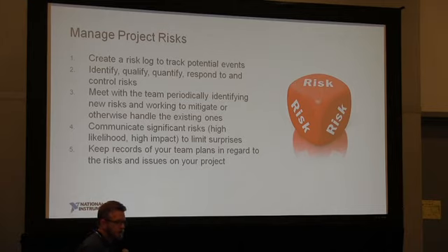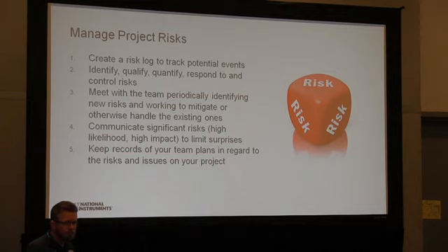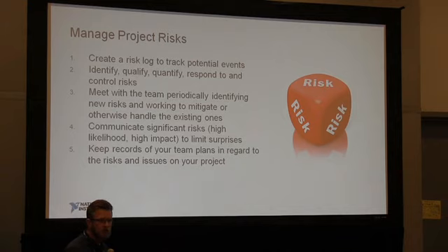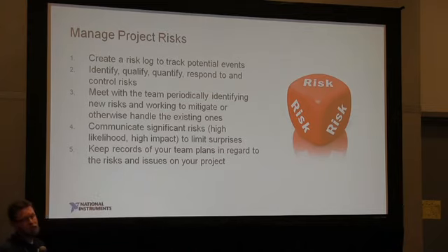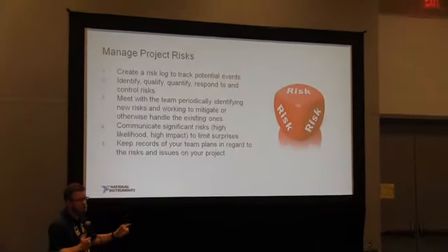If you're doing a fixed price, especially if you're a contractor to another organization, and there's a lot of risk, you don't want to be stuck eating all those risks. You know, hey, this didn't happen the way it was supposed to. We knew it was a risk, and so we're going to have to eat the cost of that. You need to identify that up front. Maybe you put in a risk mitigation buffer inside there. Hey, if you want me to do this fixed price, you have to understand I have to charge you more because of these unknown things. So